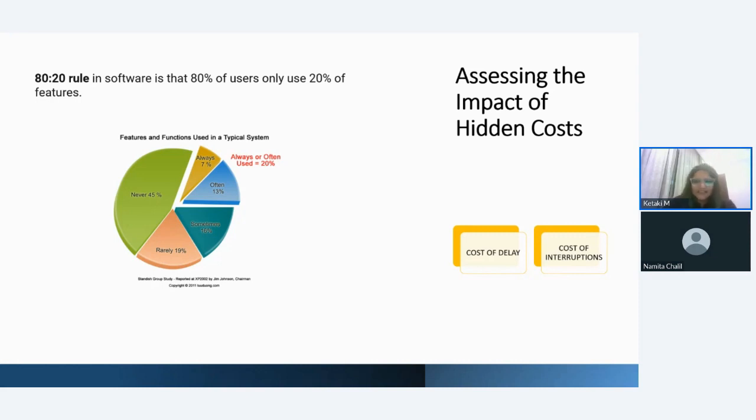The cost of the restart: when you kickstart a motorbike, you really have to pump up some more diesel into it, right? And that is the cost to restart, to reassemble the resources, to reassemble our thought process. It all encompasses a hidden cost. The cost of wastage, either from the earlier work going bad, or because the problem that you were solving has evolved and now some of your earlier work is no longer valid. All these things have an accumulative effect on the hidden cost.